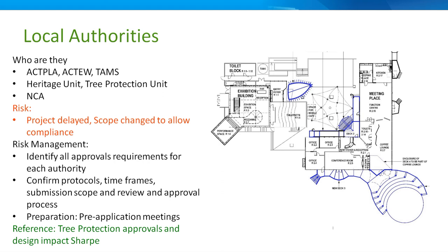And you can't manage your projects to occur in a linear fashion or a sequential fashion that suits your skill set and capacity. It's going all over the place. You put out a tender and the client, close your ears, Mel, the client will say, we'll give you a tender result next week. I've never had a tender result next week. They always take a lot longer, but the start date often doesn't change or the end date. So you just know that this is a real variable.